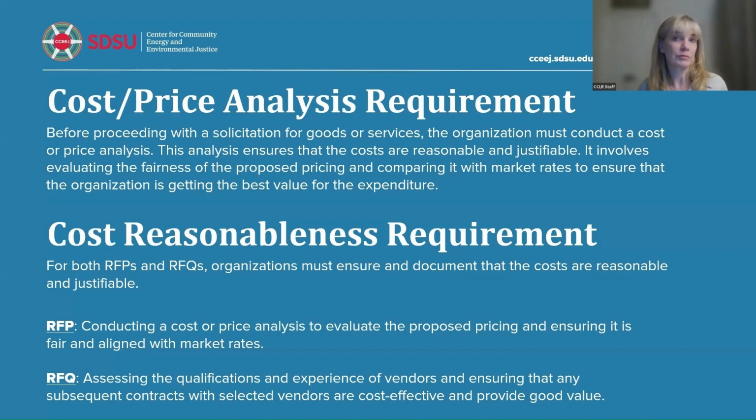it's defensible, right? Okay. So the RFP, conducting cost price analysis to evaluate the proposed pricing, ensuring it is fair and aligned with market rates. And with the RFQ, you still have to do it, assessing the qualifications and experience of vendors and ensuring that any subsequent contracts with selected vendors are cost effective and provide good value. Okay. Free and open competition, good value for the expenditure.